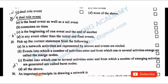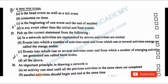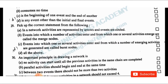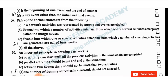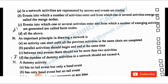Pick up the correct statement from the following: In a network, activities are represented by arrows and events are circled. Merge nodes are events into which a number of activities enter and from which one or several activities emerge. Burst nodes are events into which one or several activities enter and from which a number of activities emerge. The answer is: all of the above.